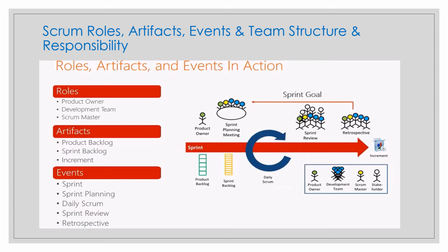The developers meet in the daily Scrum to synchronize, identify problems and impediments, and keep work moving forward. Along the way, the Scrum Master keeps the team focused on the sprint goal and helps remove any impediments that affect them. At the end of a sprint, the product increment should be potentially shippable, and the Scrum team together with the stakeholders conducts a review of the work completed and discusses what to do next.